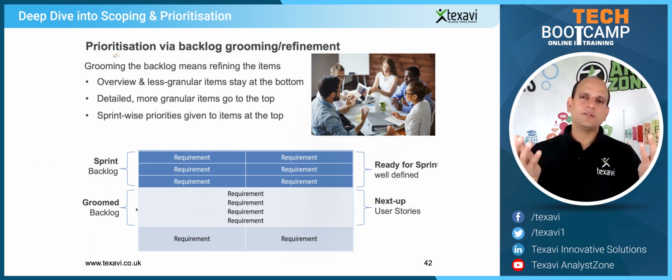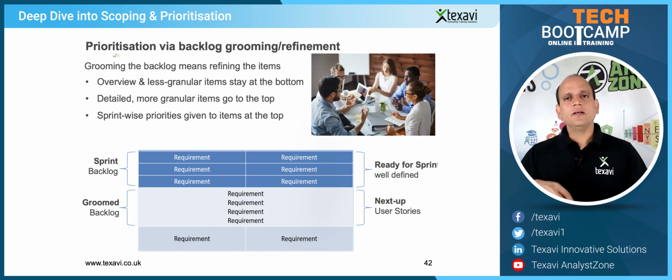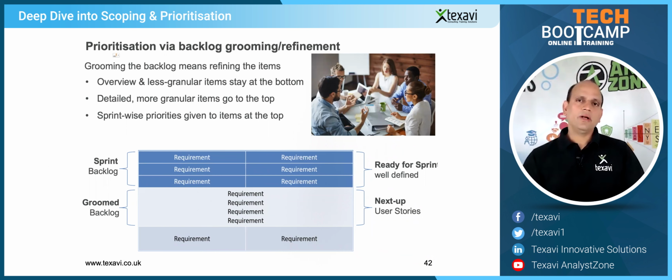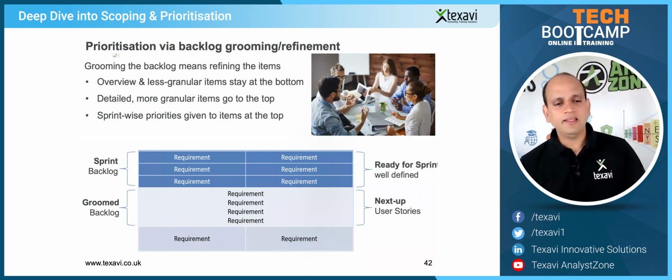The business analyst adds to acceptance criteria, creates some wireframes, adds the Gherkin statements, and adds more and more descriptions. They give estimates, the user story points that are attached to them. And then we'll have an idea as to the size of these requirements, and the potential effort that is needed for them. And then that is groomed and made ready for the next sprint, potentially.